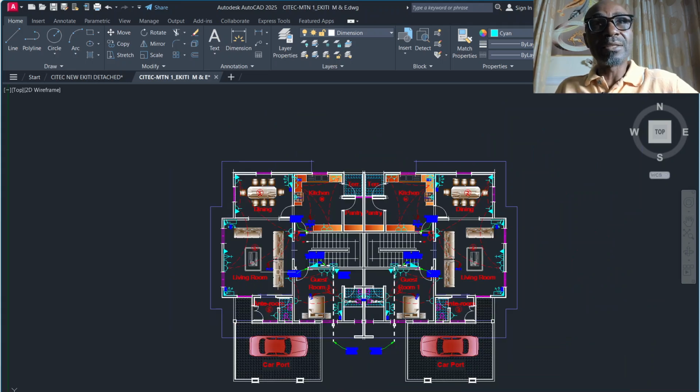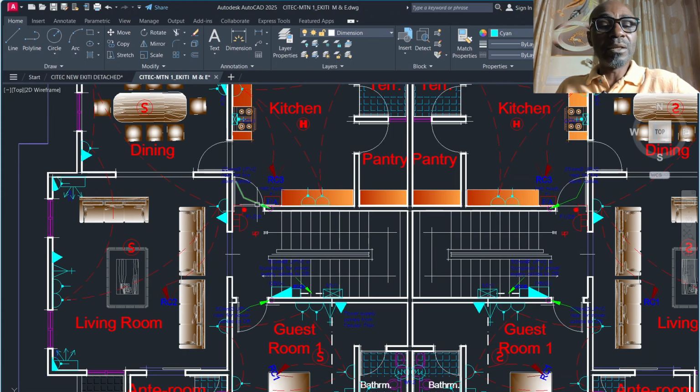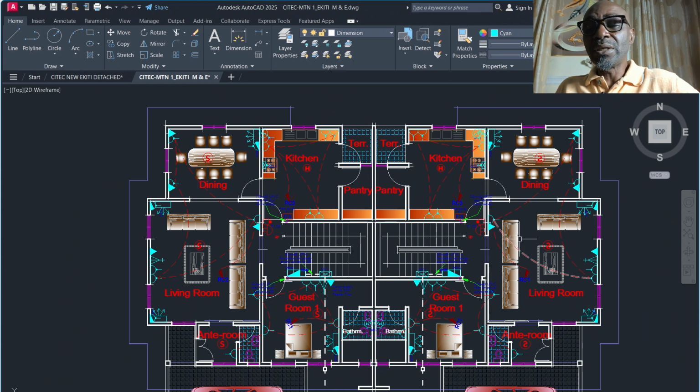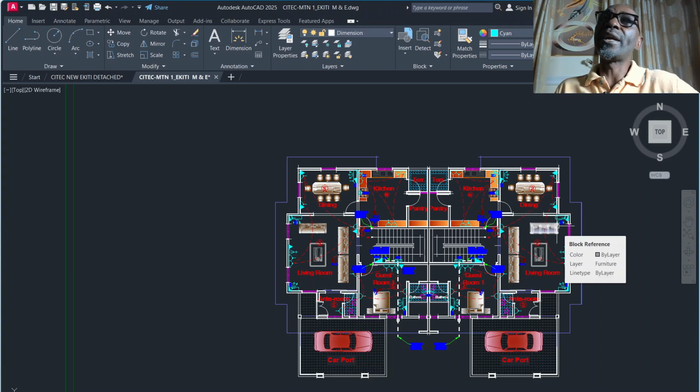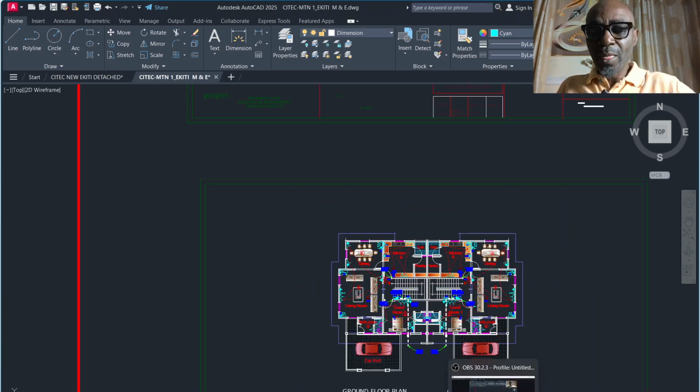You are going to apply how many meters, multiplied by the cost for 1 meter. Then the same thing you do for the kitchen, which is the cooker unit, from the kitchen to the DB. You get what the cost is. If it is 40 meters, it is 40 meters. If it's just one cooker unit that is there, it is 40 meters. You apply 40 meters. If it is 20 meters, you apply 20 meters, and that is the price for that point.